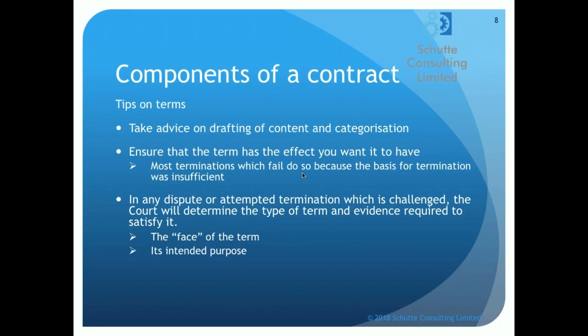Is it some sort of secondary promise or an assurance item? Or is it just an ordinary term that helps the contract to move along? How central is the term to the contract? Again, that's the heart question. And there are also a number of statutory rules which have to be taken into account. Those provide constraints and limitations on certain types of terms, and the court will look at those as well. So those are all the sorts of factors which the court is going to look at when it's asked to rule on the term which is being challenged. So get your terms right and try to avoid those situations.